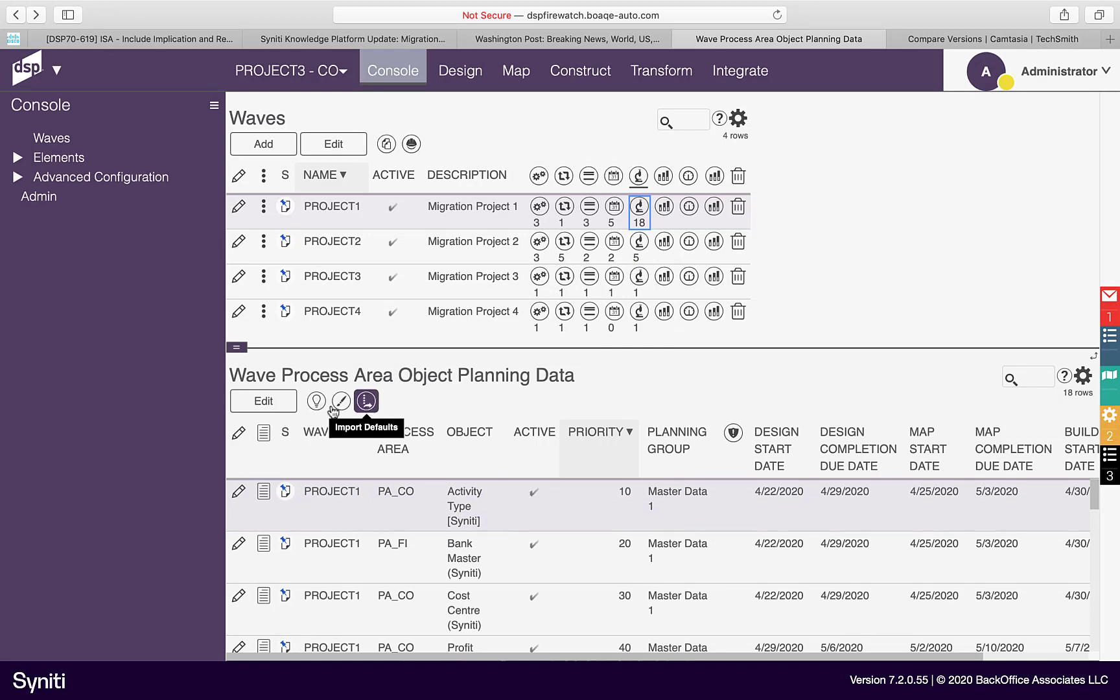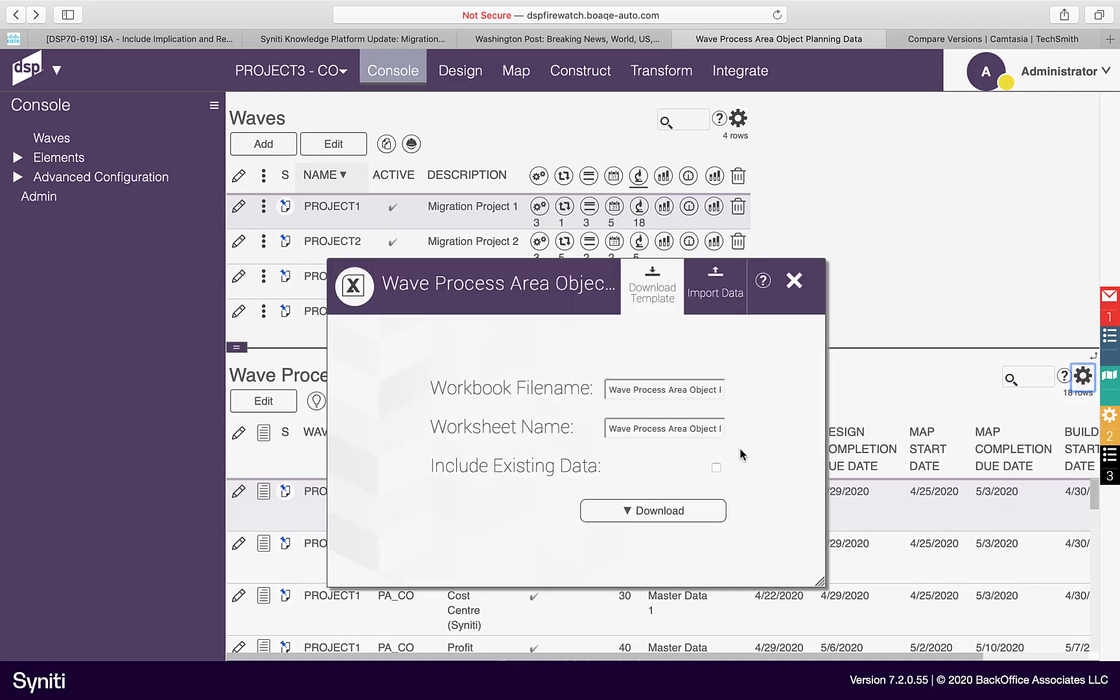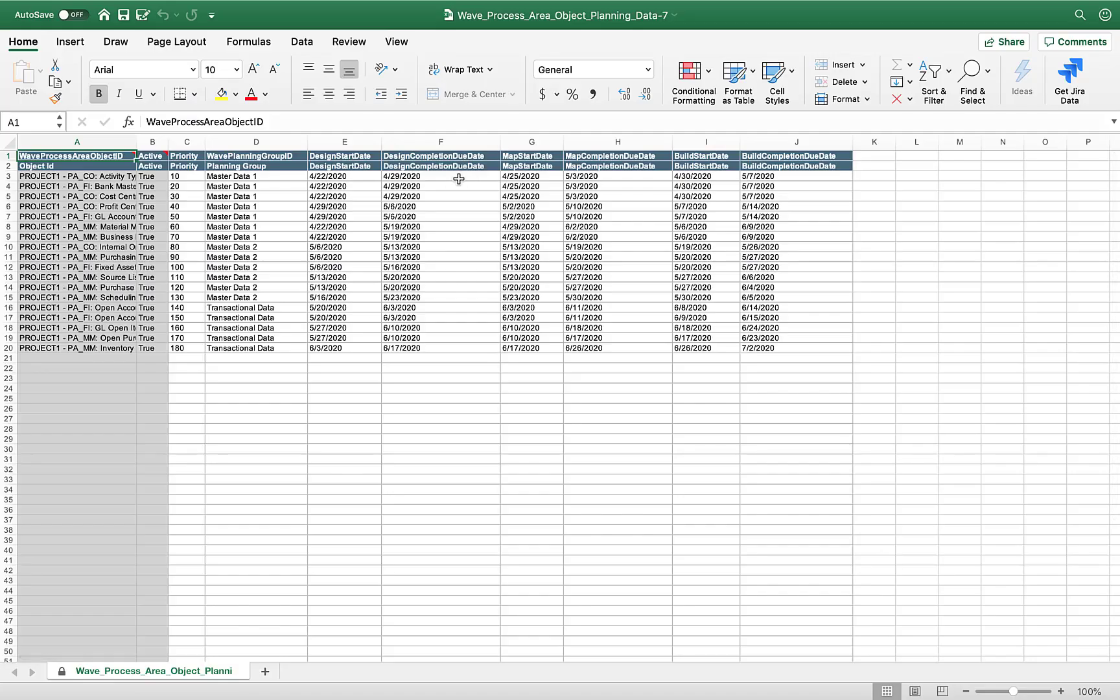Consultants can communicate that target design activities are complete by clicking the Set Design Finished icon. Project managers can efficiently update planning data by downloading all objects in a wave to Excel, modifying the data, and then uploading the data back into the Stewardship tier.